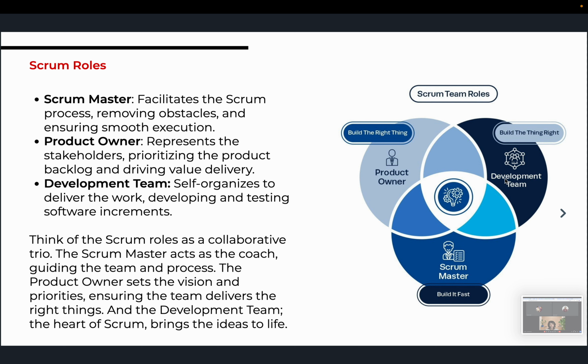All right, so our intention is to add value to the user, to give the user value. So the user story usually has a format: a persona, the need that persona has, and then the benefits, and then you now create your acceptance criteria too. Don't worry, we are going to have a practical session on that and you can see what I mean.